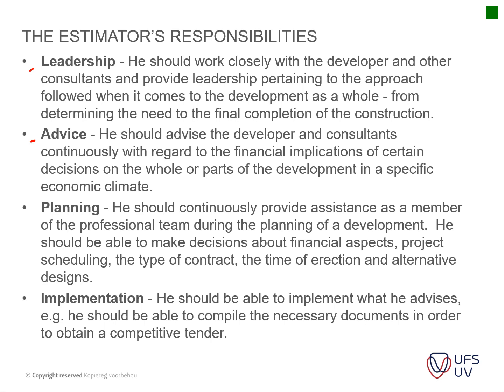Then you've got planning. You should continuously provide assistance as a member of the professional team. So you should be at the planning meetings, to understand what everyone is looking at. For instance, it might be said in a design meeting that access control to the building should be included in the price, or it might be said that it should be excluded from the construction cost, and then the client would pay for it himself.